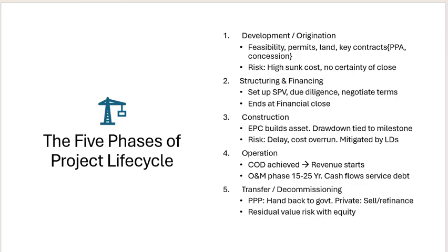We need to get the lender's independent engineer report. We send the engineer to review their report, understand the progress of the projects, and audit the project, understand the audit progress and why there is a delay, if any. What amounts do they store in the debt service reserve account, and what escrow mechanism do they follow? We need to check all these things, then transfer and decommissioning.